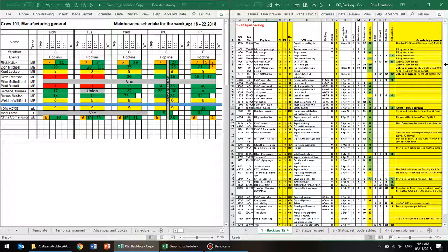Now, from my experience, operators really like to see a schedule like this and it has great value for them. That's the end of the scheduling process. Most of what's in this video is setup. Once you have the templates all set up and the backlog in place, the amount of work needed each week is very little. I estimate that to prepare a schedule like this takes less than an hour, and 1 hour to organize over 400 hours of trades work I think is very efficient management.